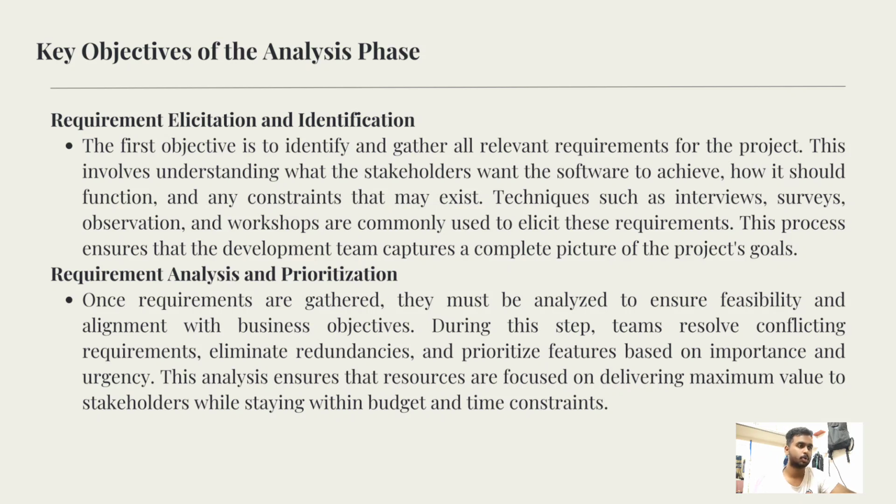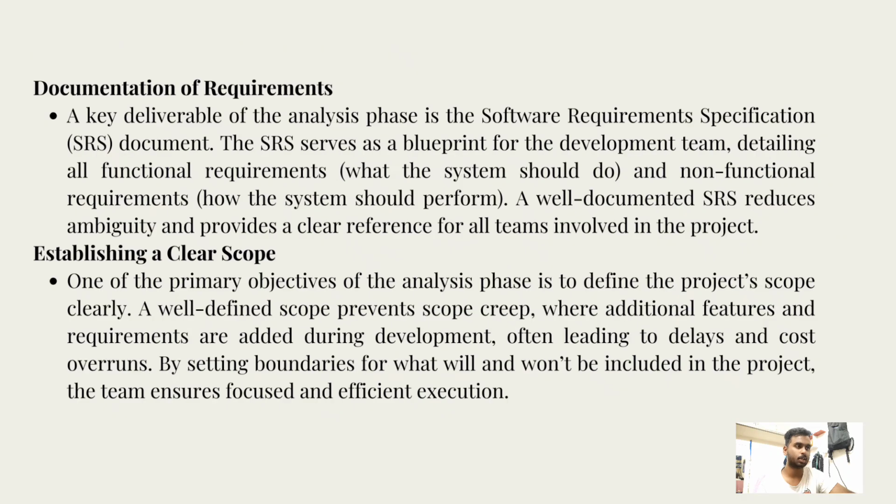Requirements analysis and prioritization. Once requirements are gathered, they must be analyzed to ensure feasibility and alignment with the business objectives. During this step, teams resolve conflicting requirements, eliminate redundancies, and prioritize features based on importance and urgency. This analysis ensures that the resources are focused on delivering maximum value to stakeholders while staying within the budget and time constraints. So, the documentation of the requirements.